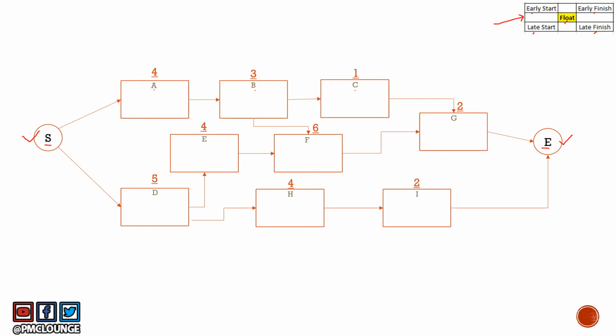So all the activities that you see on this slide will be represented in this fashion, right? Now, the number that you see above each activity, here you see 4, this is the duration for that activity. So just like how we calculated the critical path in our previous video on critical path, we simply go ahead and find all the paths, and we add all the durations of the activities on those paths, and we are able to find the critical path.